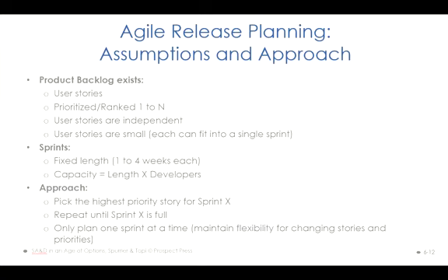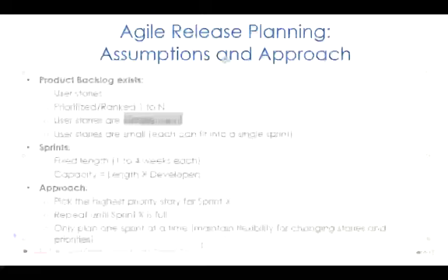And on this particular slide, there is actually one keyword I would like to draw your attention to. This keyword is called independent. This independent, again, I cannot emphasize more. Each user story is a small program module. They have to be running and can be tested independently. So you can sort of modularize the job, modularize the program, and modularize your planning as well.